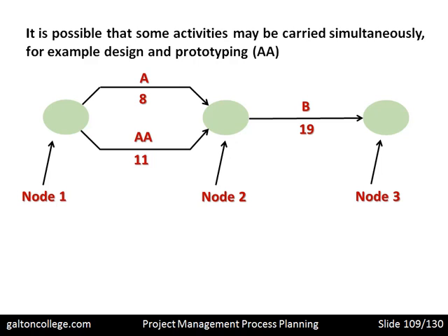So you can see that the two don't really add up there, and this would be the issue that critical path analysis would deal with in terms of its own techniques, which, as I said, is the subject matter of a separate video. But here we would have slack. We'd have slack of 3 weeks. So the design team would complete their work in 8 weeks, but the prototyping team will take 11. Therefore, the design team will have 3 weeks in which they seem to be doing nothing. It's slack. Well, that would be wasteful, so it's a question of finding ways around this.